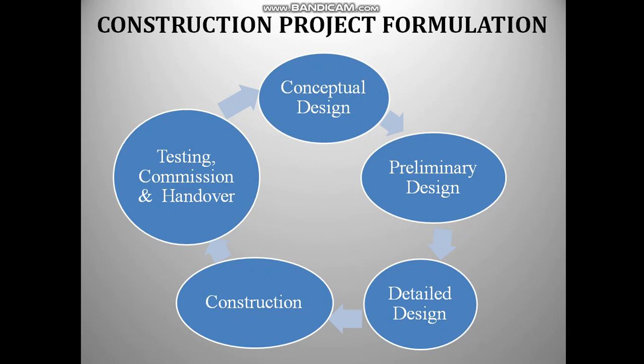Some of the activities of the conceptual phase include identification of need by the owner and establishment of main goals, feasibility study which is based on the owner's objective, identification of the project team by selecting other members and allocation of responsibilities, identification of alternatives, financial implications, resources that is based on estimation of life cycle cost of the favorable alternative, time schedule, land and geological survey, location of the project, enumeration of major problems in translating the project to reality. So, this is regarding the conceptual design.